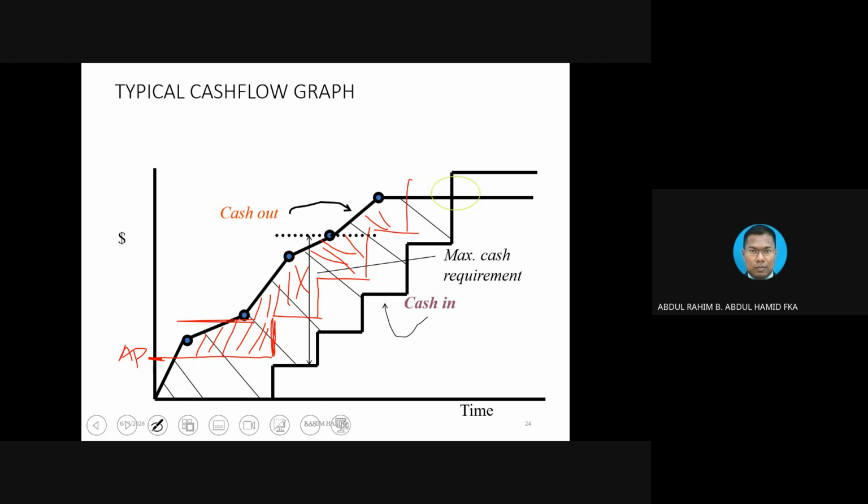Okay, in the government project only. Private sector, sorry, they don't bother. So advance payment is to help the contractor. But again, some contractors, when they get advance payment, think that the money belongs to them. By right, the money belongs to the project. So they use it up for whatever reason, and then the project will be in trouble again. See, it defeats the purpose.